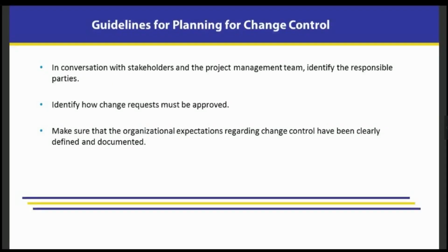Okay. Then we need to make sure that we get the team together and all of us together understand this change before we decide to approve or disapprove. Sometimes the team will decide that, sometimes the project manager, sometimes the sponsor. There may be a governing group called a CAB. They might make those decisions. But either way, we would have to lay down ahead of time who gets what when. How much over budget would it put us in order for it to go to a CAB versus making that decision as a team? So very small changes might be approved by just the project manager or the team. Bigger changes need more formal approaches.